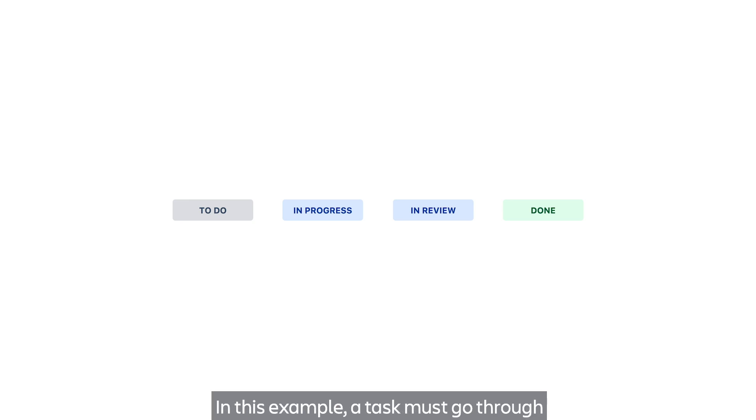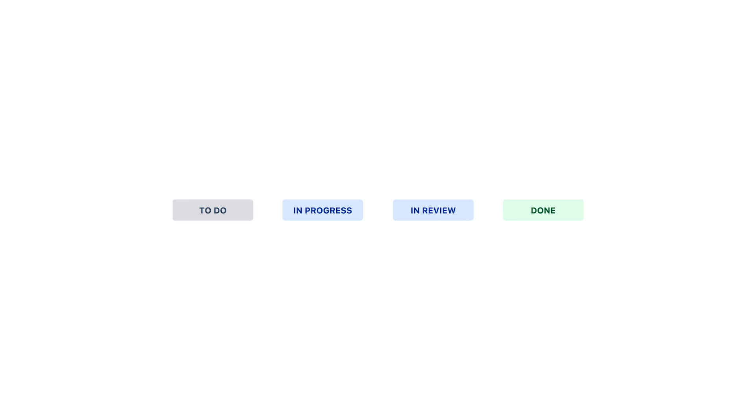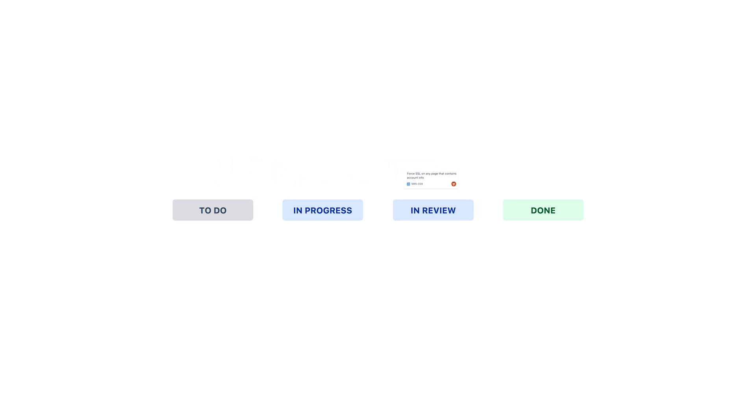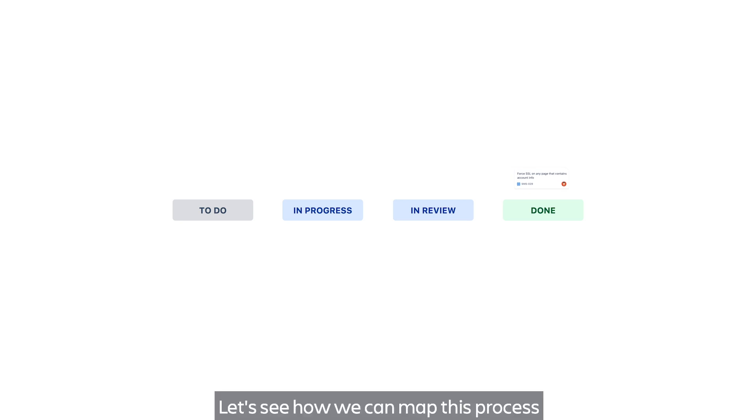In this example, a task must go through the following steps for completion: to do, in progress, in review, and finally done. Let's see how we can map this process in Jira Software Next Gen.